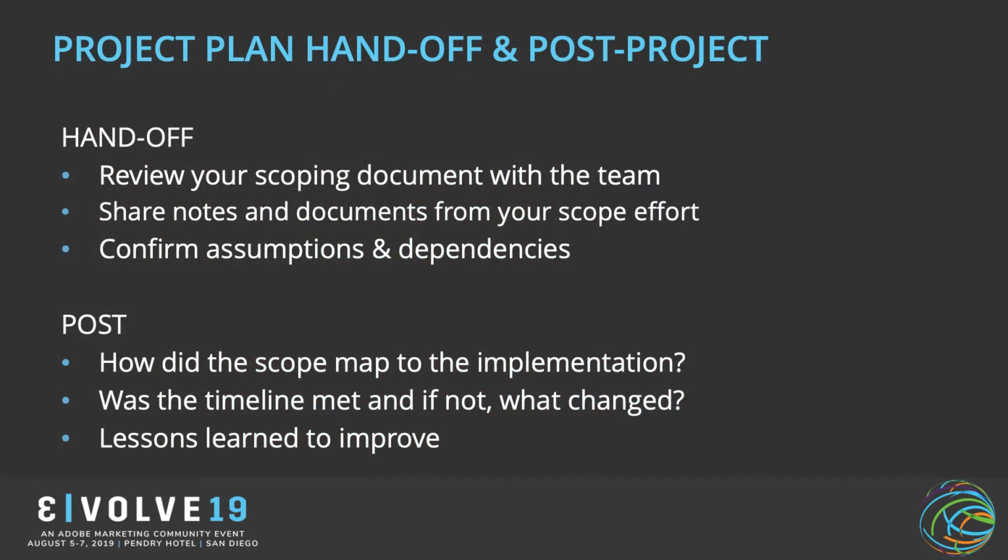Lastly, at the end of the day, when I'm done scoping, I have to hand this off to a team. So often what that process looks like is I'm reviewing the scoping document that I put together, sharing all those notes, any documentation from design, anything that I've collected that can help them be successful. And I'm also confirming those assumptions and dependencies that I know, so that when they walk in the door on day one, they know what they need to get started.